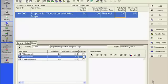Activity steps provide a way to break activities down into smaller units and track the completion of those units. In this example, the activity entitled 'Prepare for TipCast on Weighted Steps' might contain the following steps.